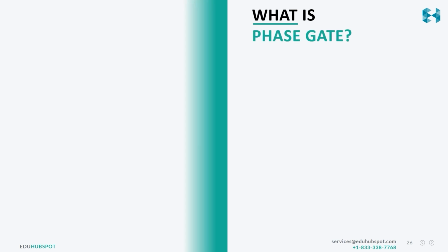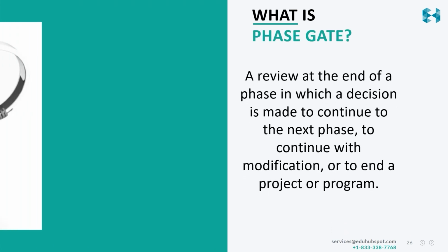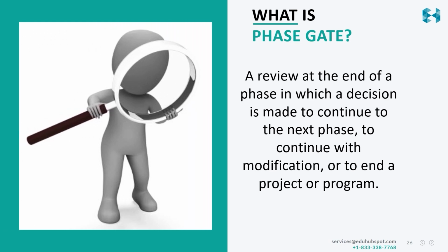Then after every phase, you have a phase gate. Now what is a phase gate? A phase gate is more like a checkpoint. At the end of the phase, you want to check whether it is worth it to move to the next phase or not. For example, I completed this entire set of videos and questions to be compatible with a laptop or a computer or a phone.